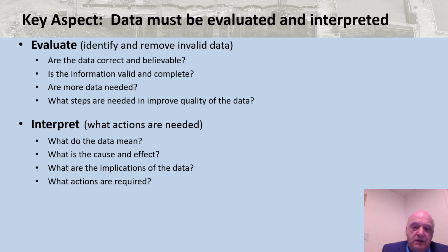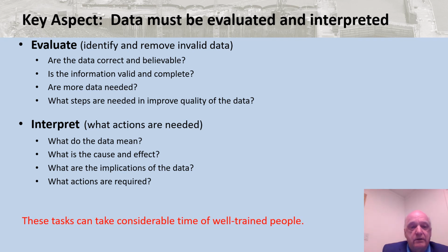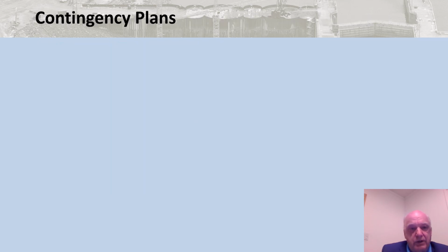The people who take the data may not really be able to interpret it. That's where engineers, designers, contractors have to take a look at this stuff. And we need to put it into a form that they can do so quickly. These tests can take considerable time of well-trained people. In many projects, it's not planned well enough to do these two steps well, particularly in low-bid projects.